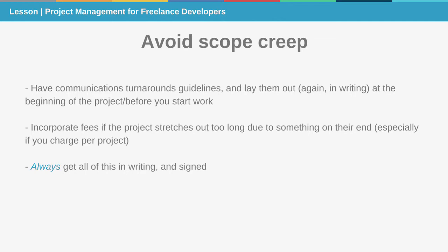So telling people, I expect turnaround time within this many days or this many hours while we're working on this project. Otherwise, I might have to go ahead without approval or put the project on hold, something like that. And making sure that these expectations are super clear. Like I said, you have them in writing, like you send this via an email, you tell them your client guidelines, things like that.